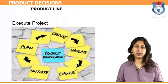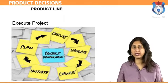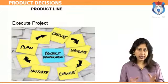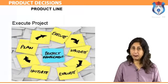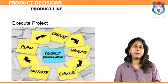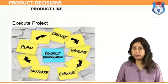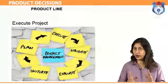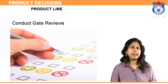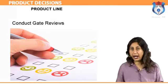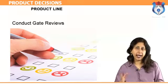Step 3 — Execute project: the major development work effort and time begins after all the key project criteria are satisfied and the project is approved for execution. Main project parameters such as project plan milestones and costs are constantly updated as development proceeds, and required resources are managed to complete the project on time and within budget. Step 4 — Conduct gate reviews: this step is continuously repeated throughout the NPD process, ensuring that main predefined conditions are achieved before moving on to the next phase of the project.